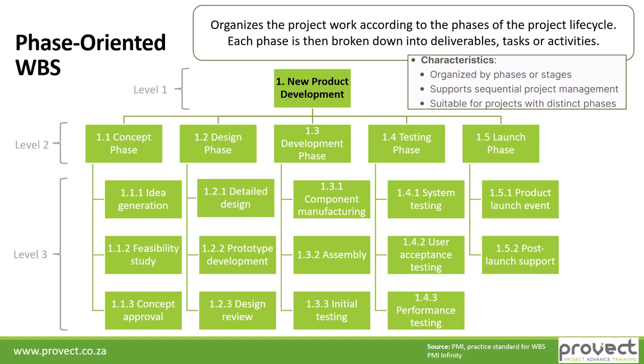Under our development phase we've got component manufacturing, assembly, and initial testing. Then under our testing phase we've got system testing, user acceptance testing, and performance testing. And lastly, under our launch phase we've got our product launch event and post launch support.